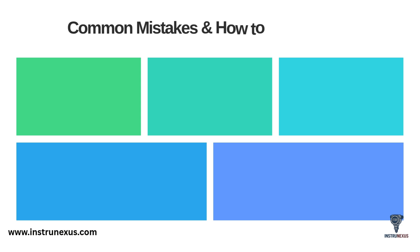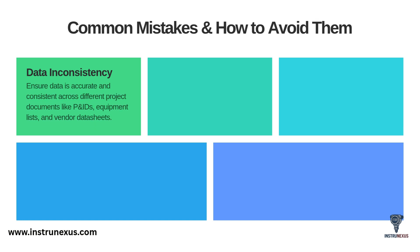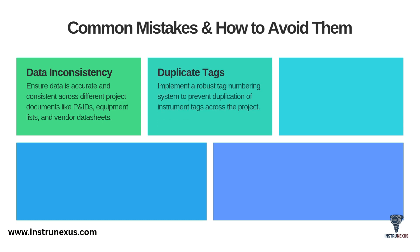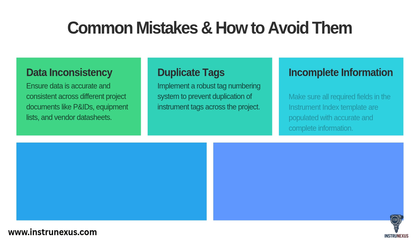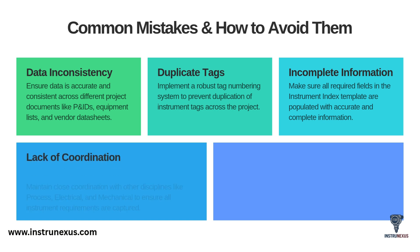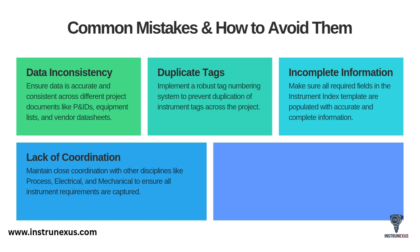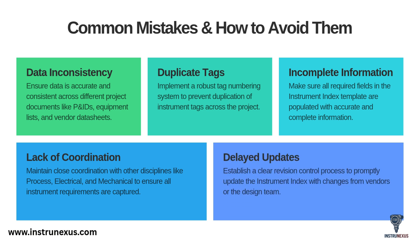Preparing an index of this scale is difficult, and there are several common mistakes to watch out for. First is data inconsistency — when your P&ID says one thing and your index says another; you must ensure data is accurate and consistent across all documents. Second, duplicate tags — a critical error you can prevent by implementing a robust tag numbering system. Third, incomplete information — make sure all required fields in your template are populated with accurate and complete information. Fourth, lack of coordination — you must maintain close coordination with the process, electrical, and mechanical teams. Finally, delayed updates — you must have a clear revision control process to promptly update the index with any changes.